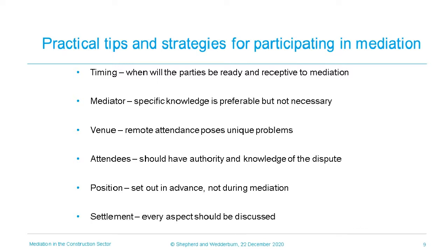There is nothing more frustrating than finally reaching a solution after days of negotiation, only to hear that, "We'll pass this up the chain and get back to you." Most trained mediators will make sure that authorities are in place in advance to avoid this happening, but it is something that parties should bear in mind when deciding who should attend on their behalf.